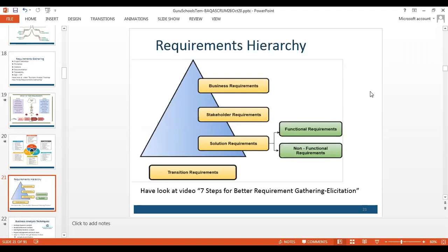And then we build the solution requirements for a typical project, product or service execution. So we will build some functional requirements and some non-functional requirements. This is a part of the business requirement document. Functional and non-functional requirements are live documents, in the sense that they get updated throughout the project life cycle. Whenever you have a Scrum meeting, or whenever we change the priorities and scenario of a particular requirement, the functional specification gets updated. The non-functional specification also gets updated, because there are priority changes in terms of requirements, right? But normally we release the system SRS, system requirement specifications, once a month or once in two months kind of scenario.